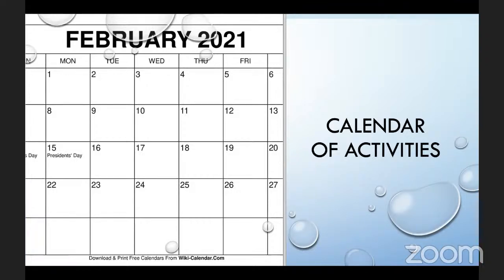So usually a sprint, right? In a typical Scrum methodology or framework, we have a 2 week iteration. Let's say we start development work from the 1st of February, as you can see from the calendar over here. From the 1st of February, that means that sprint will end on the 12th of February.